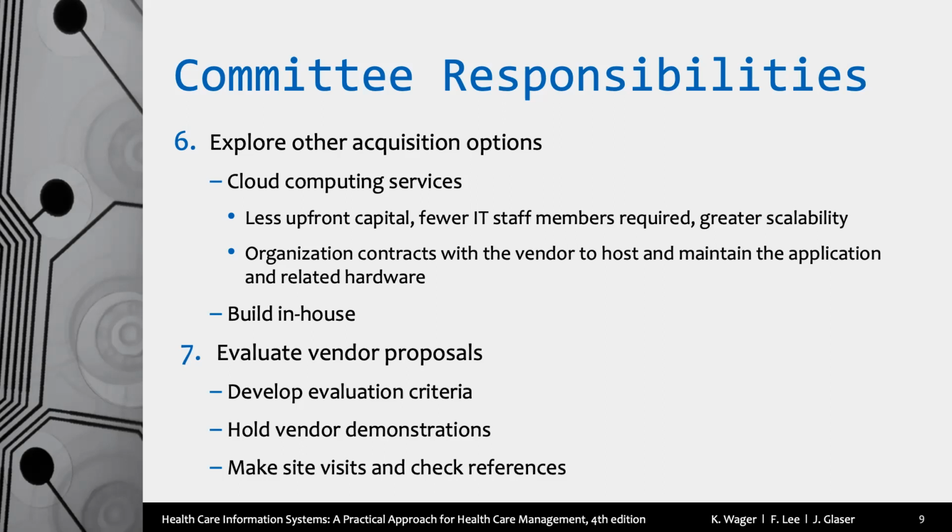Once we make that decision, cloud versus in-house, we then look at those vendor proposals. We have to create fair evaluation criteria on how we evaluate those proposals. Years ago, when the Department of Defense put out an RFP and said, we're looking for someone to come in and replace our system, the two finalists for that bid were Cerner and Epic. Cerner got the bid. Epic later came back and filed suit, saying it was not a fair evaluation criteria and they were not fairly evaluated, and it got hung up in the court system for a long time.